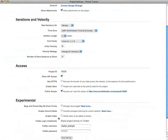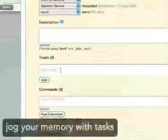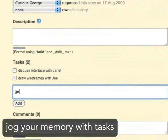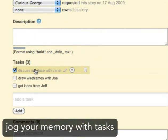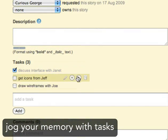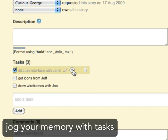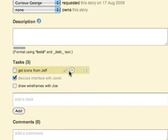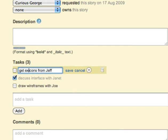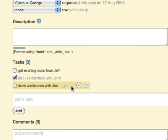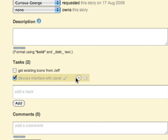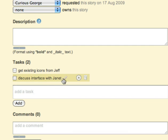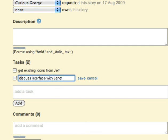If your project has story tasks enabled, you can add tasks to stories and check off when they are complete. Tasks can be reordered, edited, and deleted. To add details, like whether you've started a task, how long it took, or who you think should tackle it, just add them to the task's description.